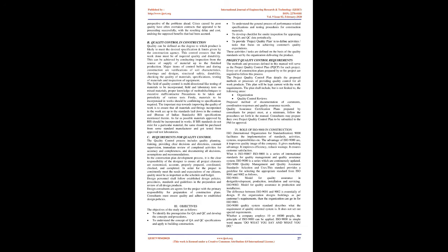Firstly, materials to be incorporated in works should conform to specifications required. The important step towards improving the quality of work is to ensure that all materials and fittings incorporated in the work are up to the standards laid down in the contract and Bureau of Indian Standards (BIS) specifications mentioned therein. As far as possible, materials approved by BIS should be incorporated in works. If BIS standards do not exist for a particular material, the same should be purchased from some standard manufacturer and tested from approved test laboratories.